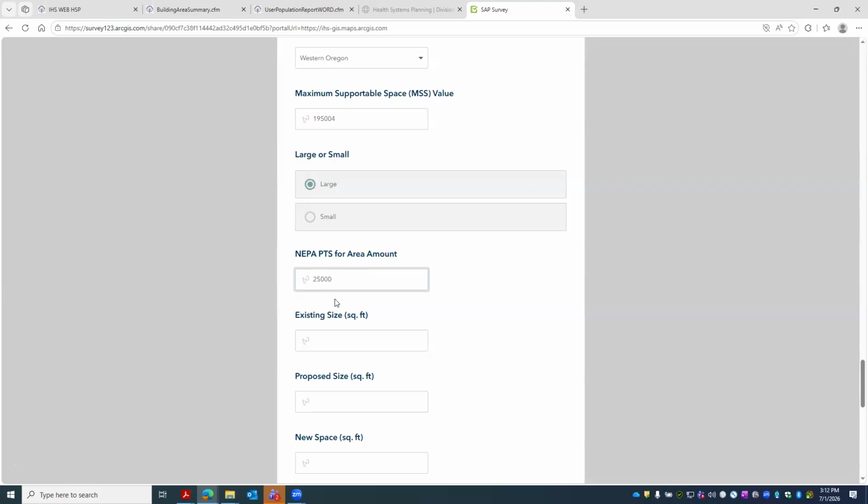And also, don't be shy about how much this costs. If NEPA costs 350,000, then put it in there, especially if you have floodplain issues or any type of mitigation. There might be a mitigation for birds that you might have to do, and that might be really expensive, or maybe you have to get an expensive survey for historic preservation with some sort of monitoring. So just make sure that you put in enough to do all the NEPA tasks that you need to complete, all of it.